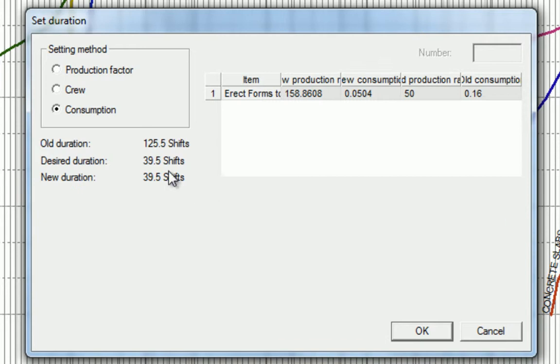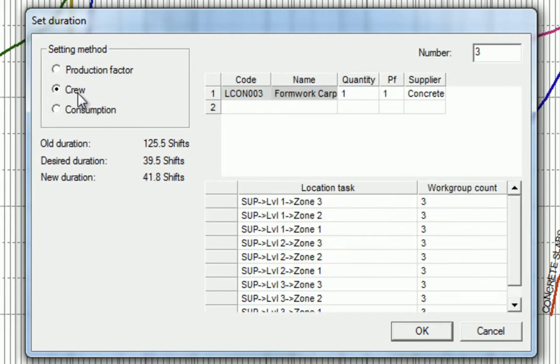We'll set the method to adjust the crew size, and as we know, when we balance resources to optimize a schedule, we must be realistic about the number of crews or resources that our trade partner can commit to.